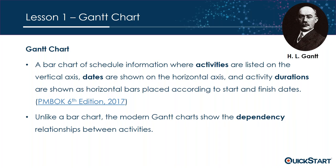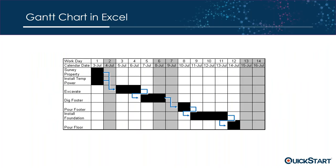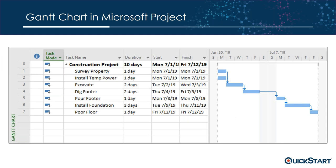I took that bar chart in Excel and created lines with arrows showing the inter-relationship between tasks — the dependencies between these tasks. This is an example of a Gantt chart in Excel that has those dependencies. The next slide is a snapshot from the Gantt chart view in Microsoft Project, which by default shows tasks down the left-hand side, dates across the top, duration depicted by bar length, and dependencies shown with arrows.